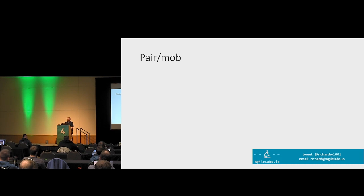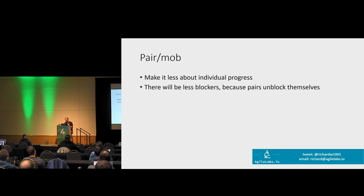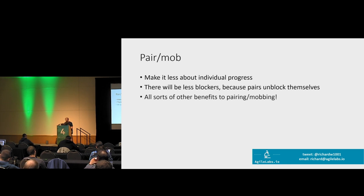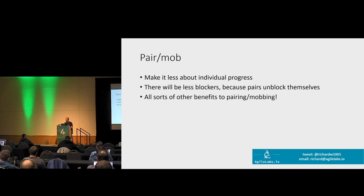Pairing and mobbing makes it a lot less about individual process. If you start working together, people basically unblock themselves — if I know one set of things and you know another, the overlap of what we know together is much bigger, and people get blocked less often. If people are working in mobs anyway and the mobs are independent from each other, do you even need a stand-up? If the mobs don't affect each other and everyone within the mob knows what's going on, do you need to coordinate between them? The answer is often no.